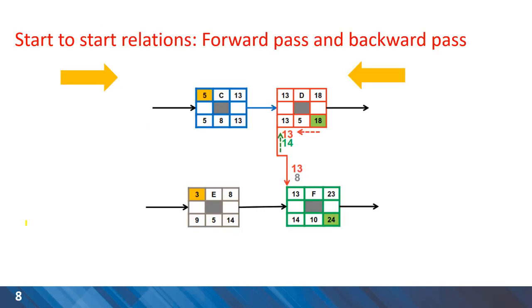Here is an example of how the calculations in forward pass and backward pass are done in networks containing a start-to-start relationship. As an example, you can see that for activity F, we have two options for early start. Eight can be transferred from E as the first option for early start of activity F, and the 13 from activity B can be transferred in the forward pass as the early start time for activity F. Because we are in the forward pass, the longest date or 13 is accepted. And then the duration of 10 is added and 23 will be the early finish time for activity F. Please go through the calculations for backward pass as well.